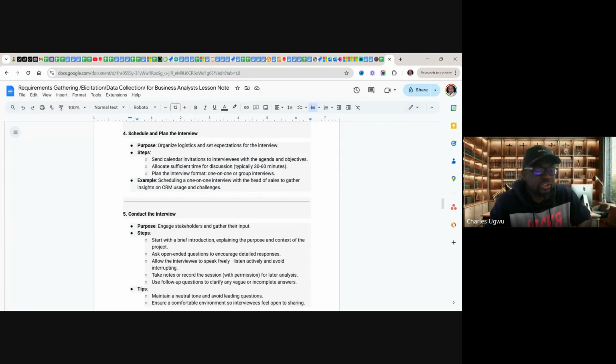Example here, schedule a one-on-one interview with the head of sales to gather insights on CRM usage and challenges. Like I say, for the rest of the department, you can use a larger focus group, and you can use one-on-one for the head of the unit. In this case, we are now combining two approaches or two techniques in one requirement gathering.